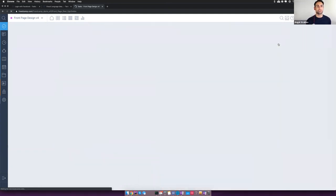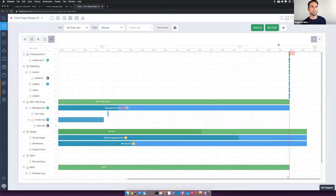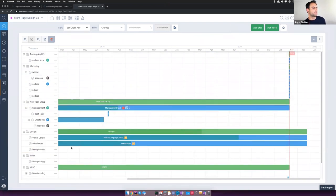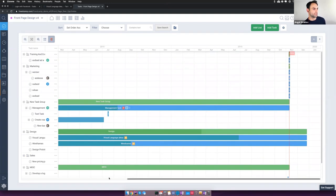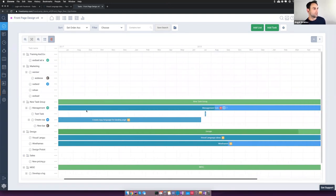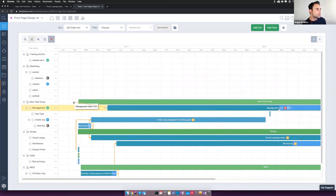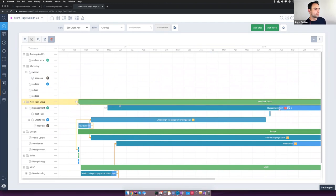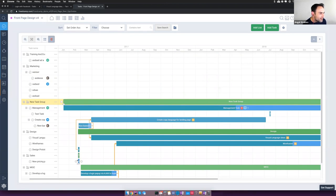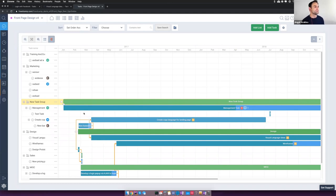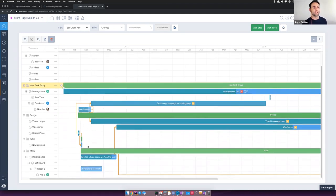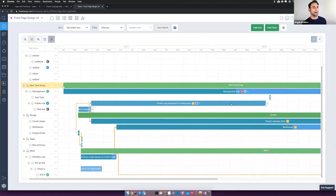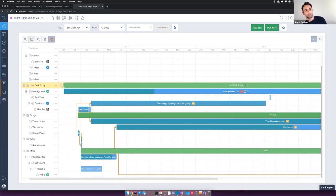Now we're going to go to the Gantt charts, which have been getting a lot of love lately. Here's all the different tasks with the little picture of who it's assigned to. If you're familiar with Gantts, I think you'd be pretty familiar with how the whole dependency thing works. We can drag and say, you're depending on you. So now this is obviously a very clear illustration of what depends on what. You will get little warnings like, hey, this is not done, this needs to be done first. You also have the ability here to really say exactly how much progress has been done on specific tasks as it gets close to the date.